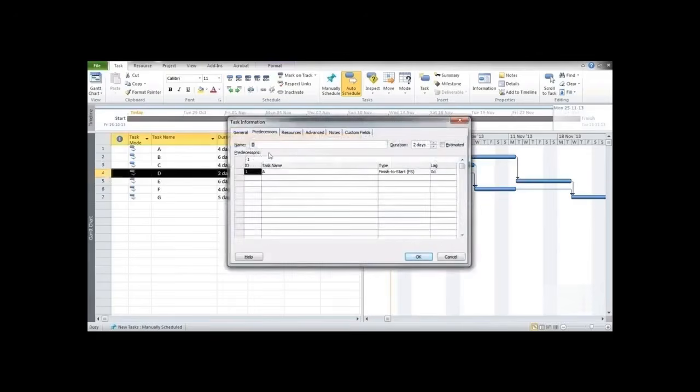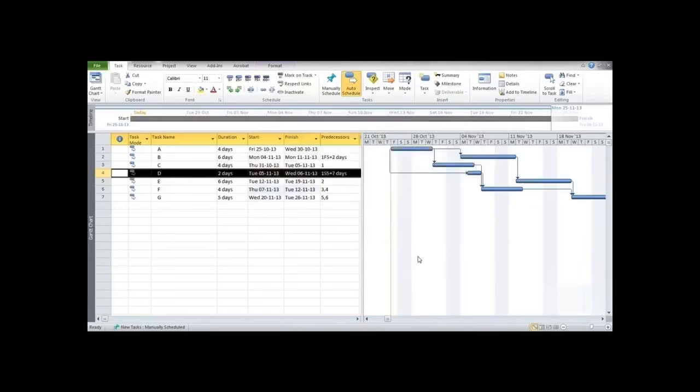So again, double click on the number adjacent to the activity. You will get this menu box open. Now click over here, start to start, and lag, adjust the lag to 7 days and click on OK. So you can basically see that this activity D begins 7 days after the activity A begins. So this is a type of relationship that has changed at this moment.